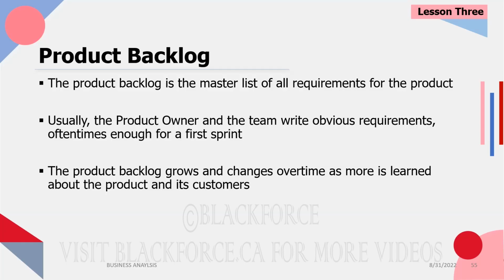Sometimes you begin gathering requirements as a BA and it's going really smoothly. Then in month 2, they're going to give you one requirement and something about that new requirement just doesn't sit well with you. And so you go back and you check the requirements they gave you in month 1 and you realize that this new requirement actually conflicts with the prior requirement. Okay? And so what do you do? You take it back to the business for them to validate it.